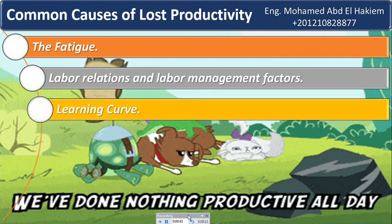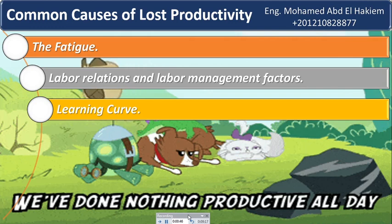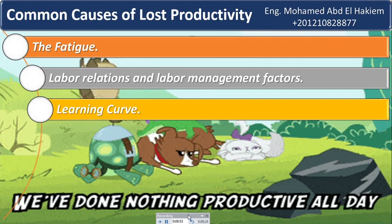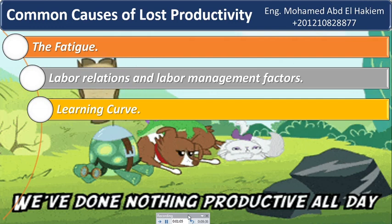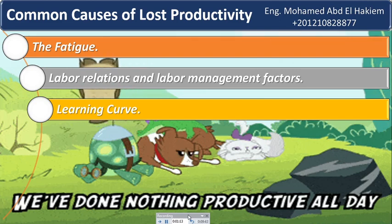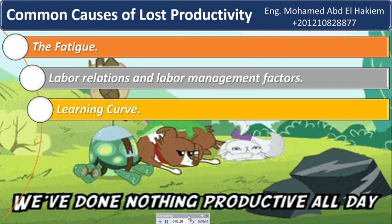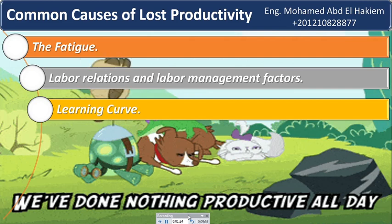Fifteen: learning curve. At the outset of any project, there is a typical learning curve while labor crews become familiar with the project, its location, the quality standards imposed, and lay-down area locations. This is to be expected and is typically included in as-bid costs. However, if the work is shut down for some period of time and labor crews laid off, when work recommences the crews brought back may have to go through another learning curve — an unanticipated impact to labor productivity. If this happens more than once, each work stoppage may produce another learning curve productivity loss.